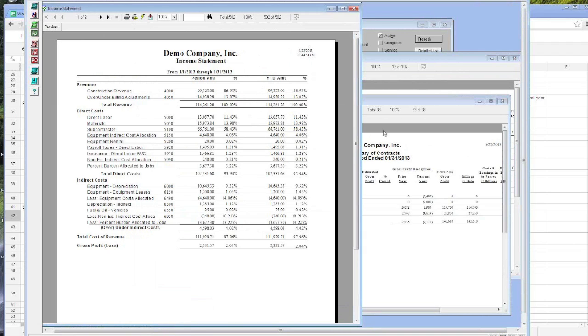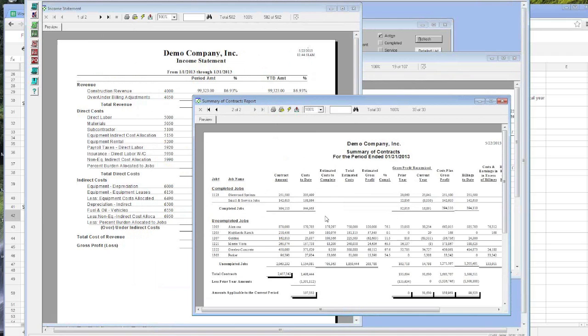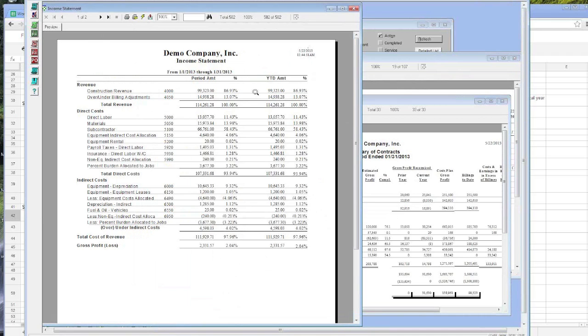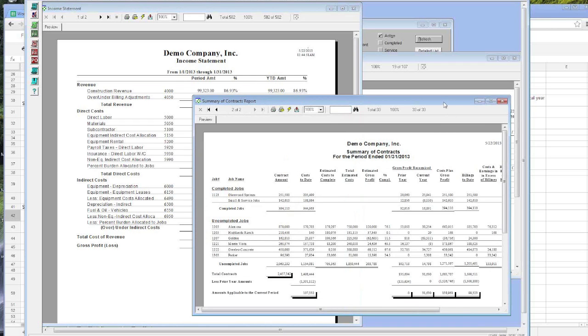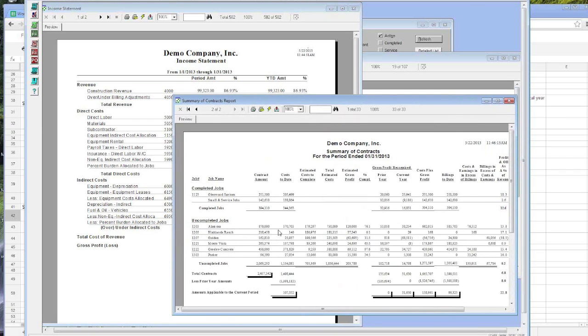In reality, my margin on that $25,000, let's say, is $5,000. So I've really made $5,000. So if my revenue shows $30,000 here, $25,000 here, and a $5,000 profit, then it would match, right? So there's some over-under billings adjustment that has to take place on the revenue account to get the revenue to match the cost plus the markup on those costs.